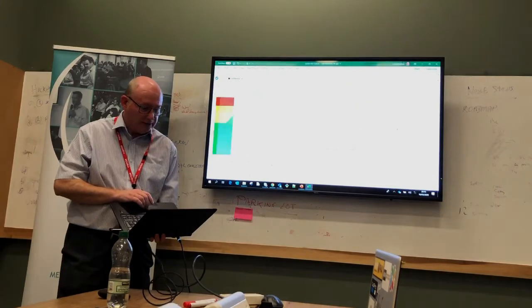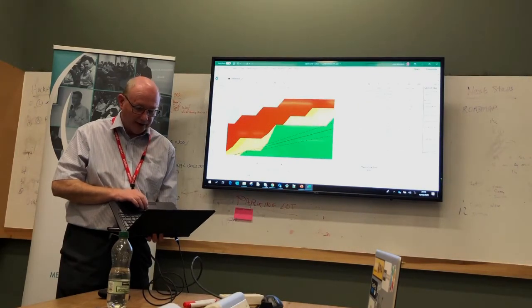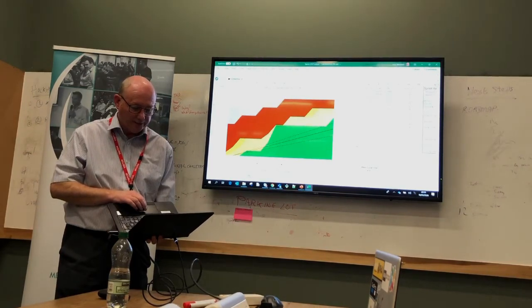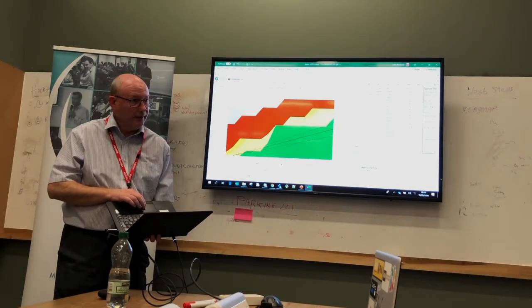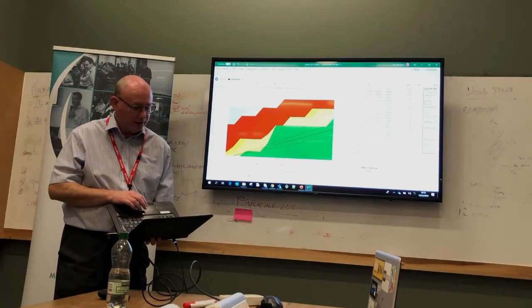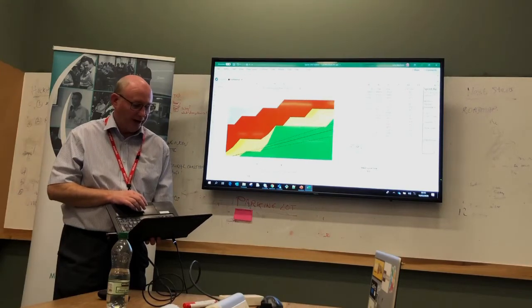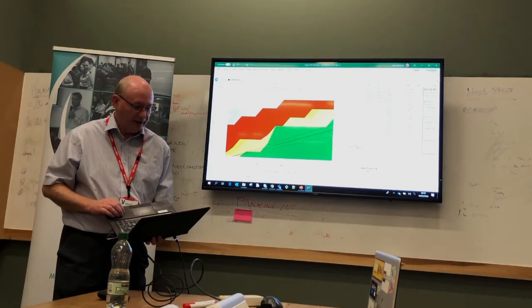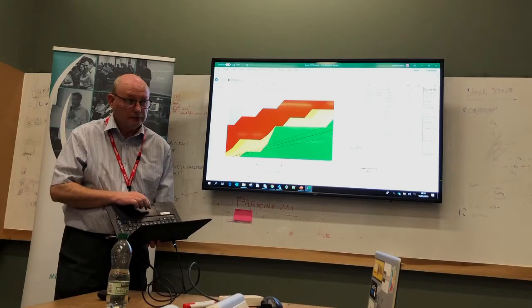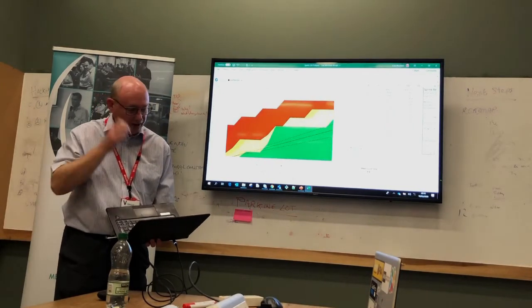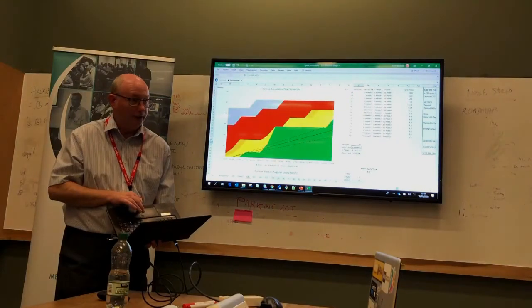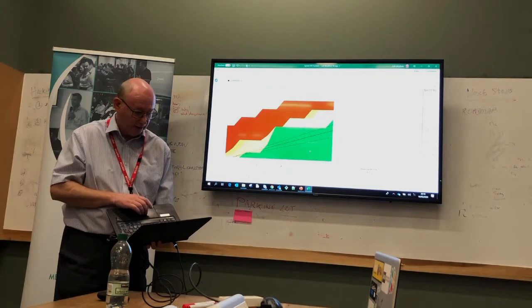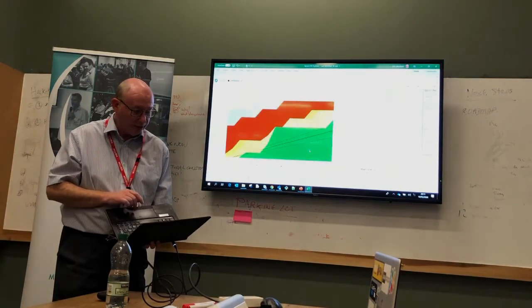And to make that work, I have this nice little table over here, which has some formulas for how many notional days of work there are in a certain period. You've got the velocity, and then up to 5 days is velocity times the desired amount divided by the number of days in the sprint, and it comes up with these numbers, and then I plot these things on the work in progress chart. But yes, it's all done with Excel.